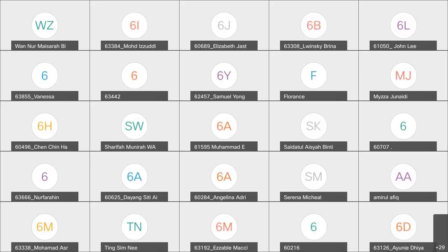After that, you will proceed to do the costing work with all your BQs, because you have your work breakdown and you have your resources list. From there, and from the time you've already got, you can calculate your costs. And the last bit is something you didn't cover in your assignment.